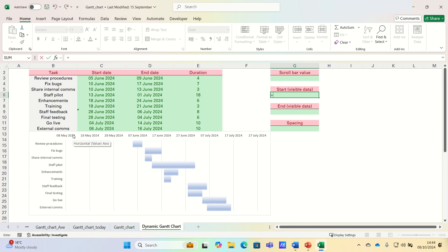We can calculate this by adding the current scroll bar value to the project's earliest start date, which is the 5th of June 2024.